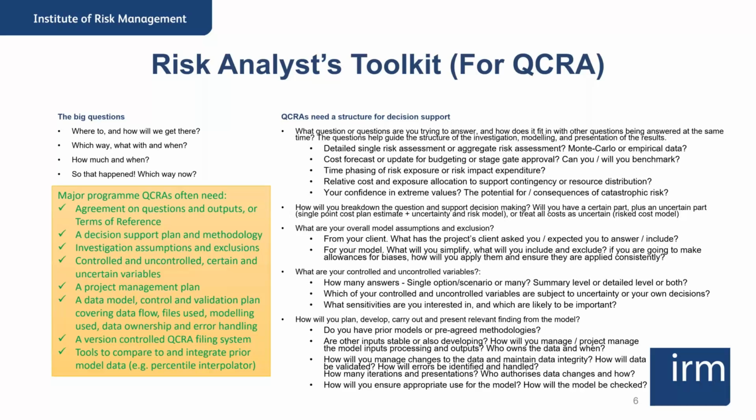Also, managing QCRAs on a major program is often a project in its own right. It deserves its own project management plan and an understanding of who's going to be involved, what resources there are, what their needs are going to be, what else they need to worry about. It's a project in its own right and deserves some good project management. And then when it comes to the data itself, you need some kind of data model. You need to understand who owns the data at what time, how it's going to be valid, and how you're going to validate it. And a good tool for a risk analyst is having a data control and validation plan that covers the data flow, lets you understand who owns it and how you're going to deal with errors.